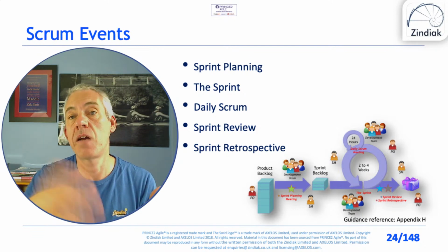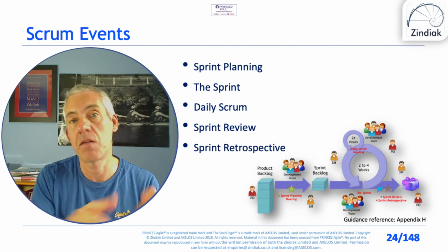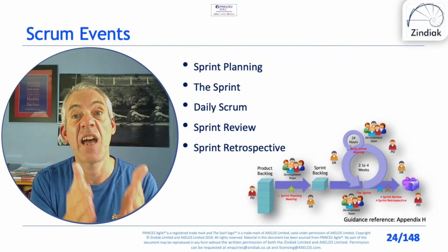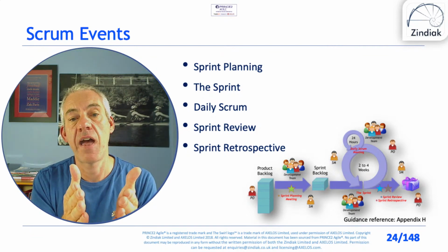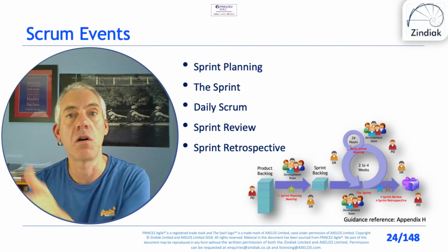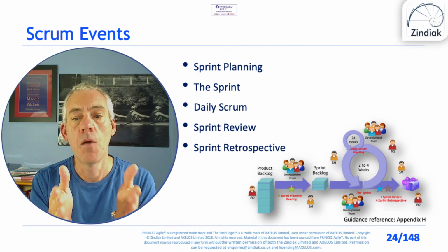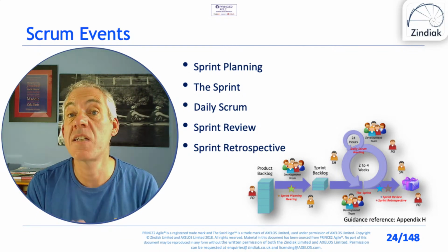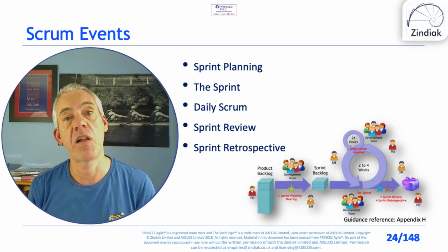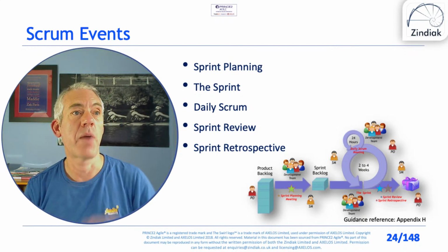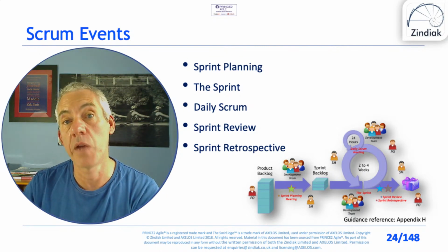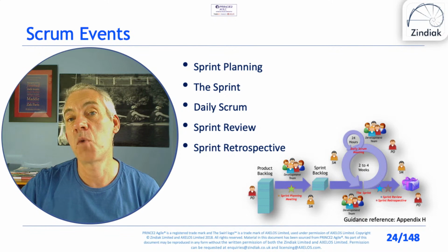The more we break them down into smaller bits, if we break them down and down and down, so we haven't got any backlog items bigger than a day's worth of effort, then we've obviously got a lot of contingency on each item, depending on when we start it. But we may have wasted effort breaking them down if the developers just come along and say, those 5 backlog items are all to do with the same thing, I'm going to put them together and work on them as one unit. So we don't want to break them down too much.